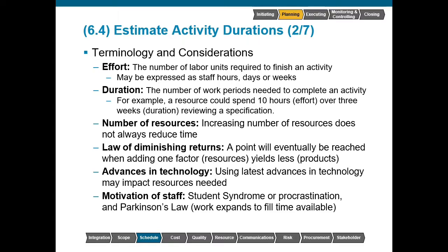So we have the example here. A resource spends 10 hours of effort over 3 weeks of duration reviewing a specification. Maybe they're only available for 3 hours and change each week, or maybe the specifications are being released incrementally.